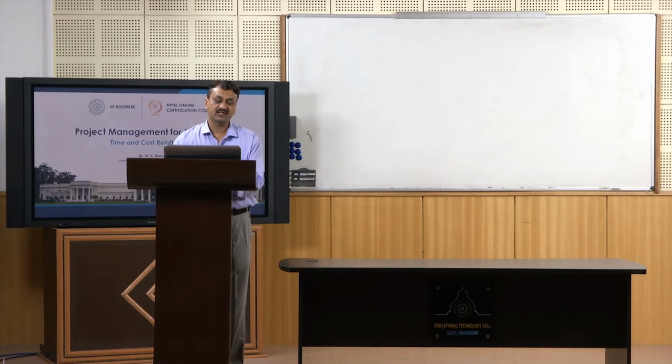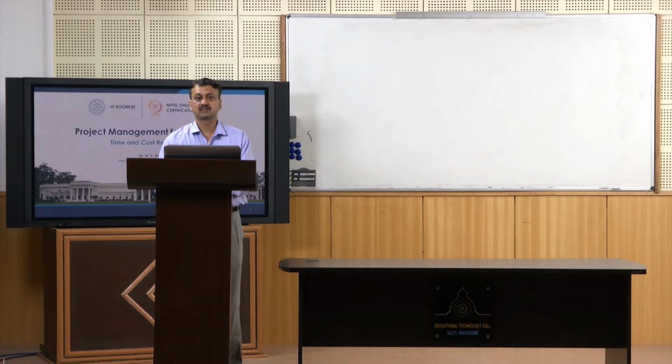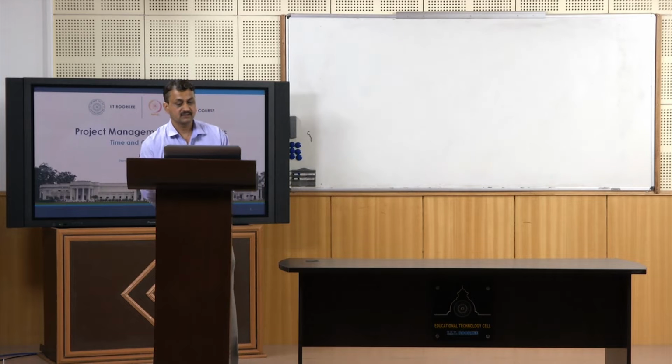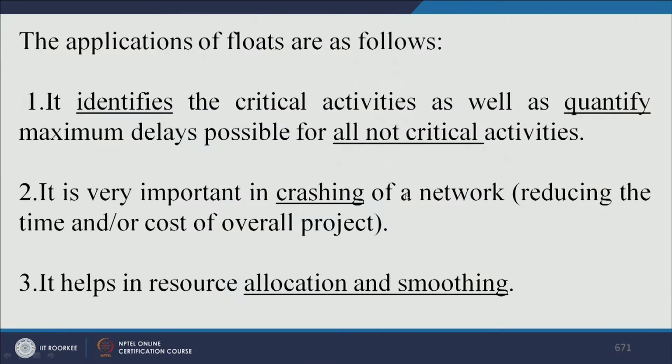There are a couple of applications of these floats. As I said, the first application is that you can know which are the non-critical activities which can be delayed, right. So it will give you up to what value you can delay a non-critical activity. It is important in crashing of network. In fact, we will be studying shortly what is crashing of network. It is nothing but the process of reducing duration of the project.